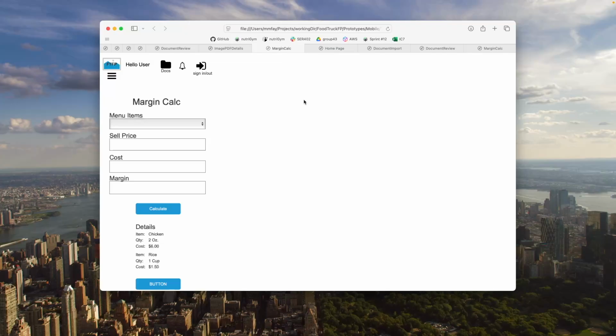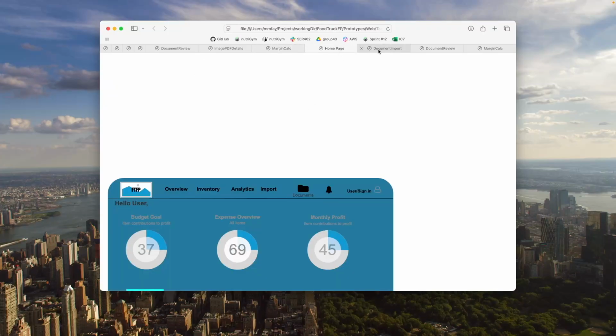This proved to be pretty beneficial since we showed this to the sponsor. She realized we were maybe going too far with the mobile portion and that she wanted a slimmed down version of the app. This helped reduce a lot of the effort on our part. We also produced some web prototypes, which are very similar to the mobile piece, but really just show more information the user can get on a web client over a mobile web client.